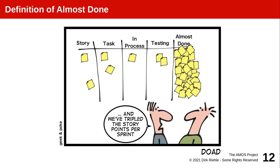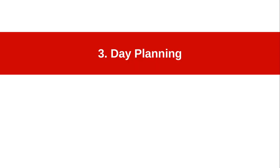When you review it, you use the definition of done. You do not use the definition of almost done. Whenever you move something into a waiting review, you, the developer, should believe that it will pass not only the acceptance criteria, the specific to the feature acceptance criteria, but also that it will pass the definition of done. And it's really not a definition of almost done. You really need to be 100% convinced that you fulfill all the properties laid out in the feature definition of done. And I probably just ruined a perfectly good joke by explaining it too much.